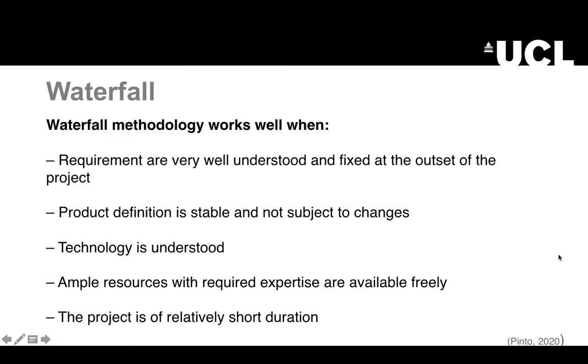The waterfall methodology works pretty well when the requirements are quite well understood and fixed from the very beginning of the project. The project scope must be clear and stable, so we can work under the assumption that not many changes are going to be introduced. The technologies needed will be well understood, and we have enough resources and the required expertise in our project team. Also, the type of project that normally works well with waterfall methodology are relatively short in duration.